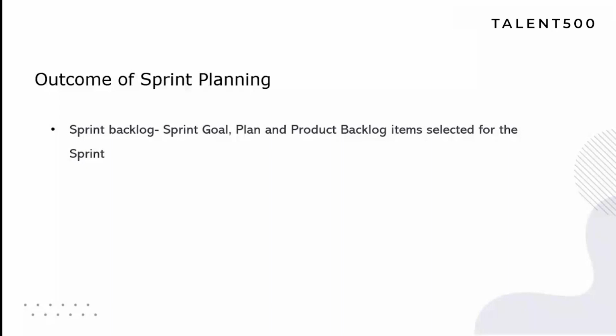As I mentioned earlier, you don't have to select your backlog items randomly based on the priority and then start doing the work on it. And how much and what you're going to pick, there is no clue to it, right? You first decide upon the goal. You see what is the product goal, what is your sprint goal, and then your goal should drive your plan and not vice versa. To explain this, I can give you one example.